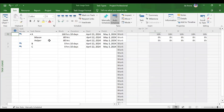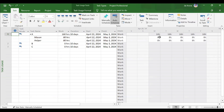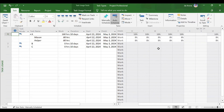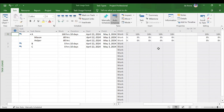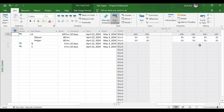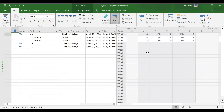In the task usage view, Mason was working 8 hours per day for 10 days, giving 80 man hours. After adding helper, the duration remains unchanged because the task type is fixed duration. Helper will also do 8 hours of work daily for the full 10-day task duration.